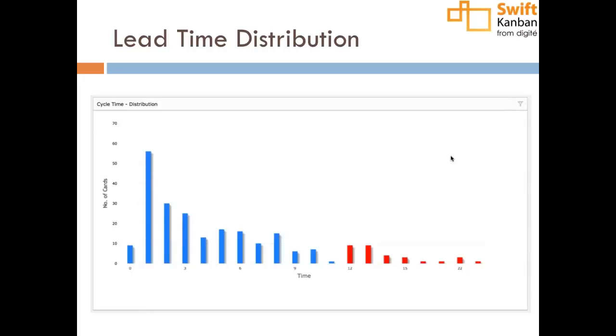Also, I suppose that in a stable system where you have a fair bit of data, it should be easy to slice and dice and look at similar items together and look at the metrics for those items together rather than for the entire data set, perhaps. For example, if you do t-shirt sizing, right? Then you can look at a particular t-shirt size. But what you don't want is, I have all these medium cards, and suddenly in the middle of them sitting is an extra large card, right? Right.